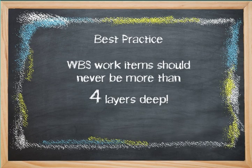There is a rule of thumb that I find very useful: limit the number of levels defined in your WBS to no more than four. If you start finding yourself creating more than that, you may be creating way too many levels and may need to expand the upper layers.